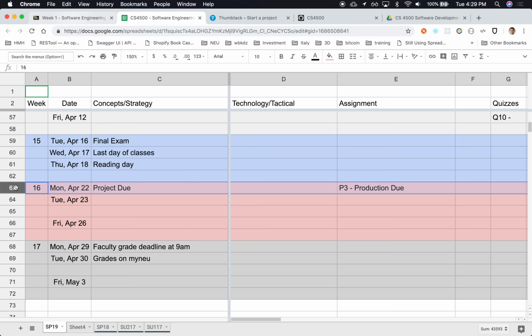So team two will inherit the features. There'll need to be some time put in the plan for doing knowledge transfer, where team two sits with team one explaining the design, the classes, what the tables are, what the services are. Very common that you work on somebody else's work, and all the challenges that go around with that. Oftentimes, you'll need to go back and borrow somebody from a previous team to come and help you.